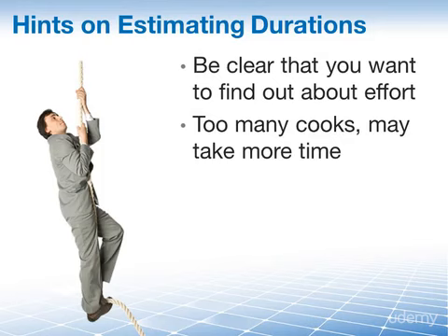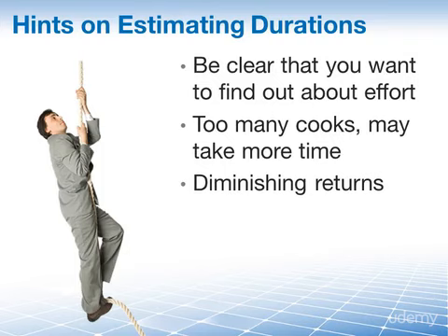Keep in mind too that there are only so many hours of working at a task before there are diminishing returns. So you reach a point when employees are overworked or fatigued, they become less productive. Adding more overtime, for example, may not be the optimal solution.